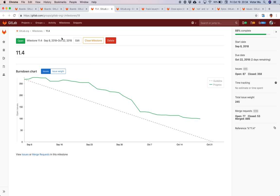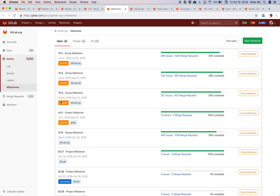Within GitLab those sprints are called milestones. Here you can see we have the 11.1 milestone, 11.2, 11.3, and so on — they go from the 8th to the 8th. There's a technical nuance: it looks like six weeks because one month is the coding sprint and then there are two more weeks to harden the code before a release. In summary, we do one-month sprints at GitLab.